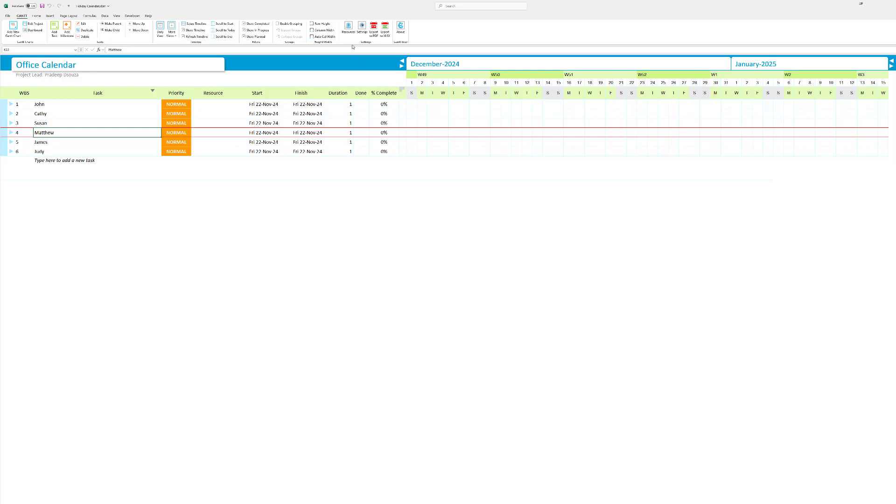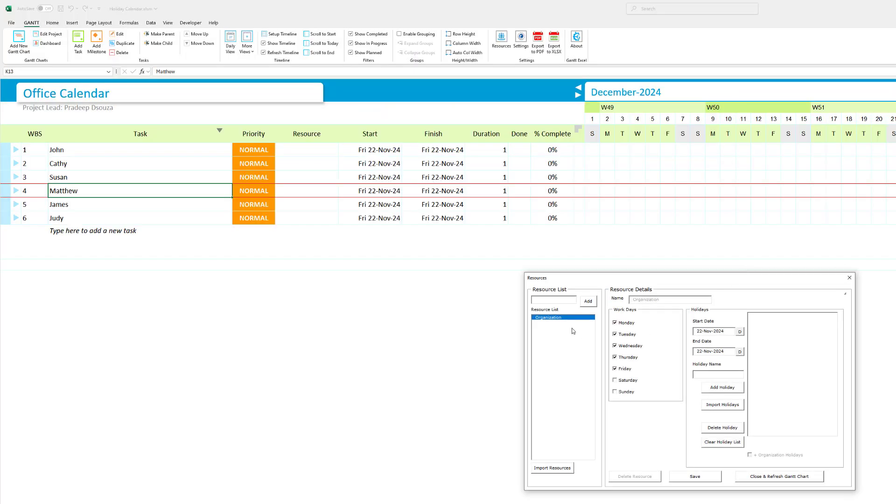Let's see how we can first add in the organization holidays. To add in the organization holidays click on resources and there's a resource by default added in as organization. Here you can set the workdays that your company works for. So let's say we have a Monday to Friday regular work schedule. Let me add in the holidays.